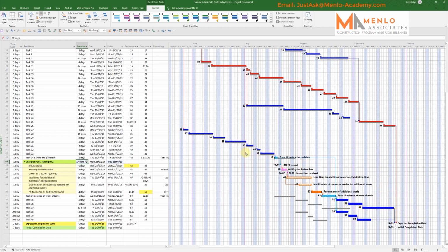So whereas this previously had very little impact on critical path, what this variation has actually done is bring it much closer to critical, and therefore much harder, ingrained in the risk of the job. This chain becomes much more risky because any delay suffered now by the contractor will push out, and if it's delay caused by the contractor, it won't be claimable as extension. It will be impact or delay caused by contractor, which is not claimable.